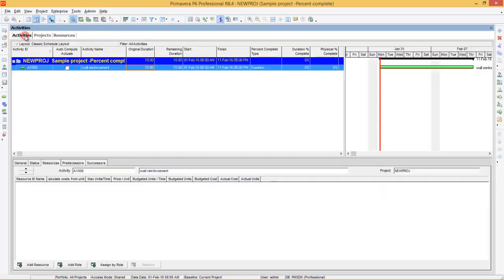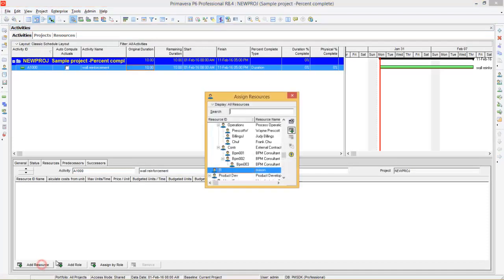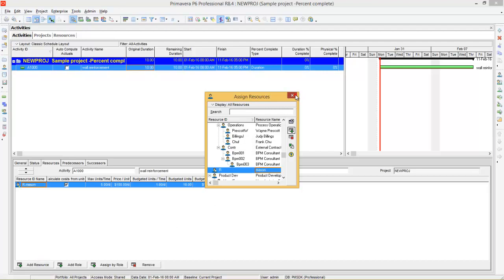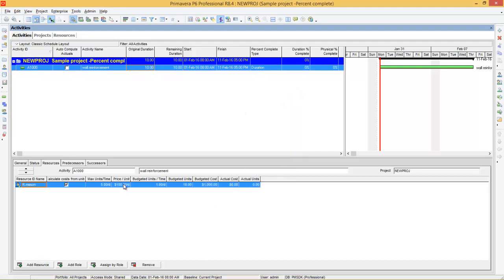After that, go back to activities and assign the resource to the activity. Click Add Resource and assign Mason. Now you can see here 1 Mason — budgeted units per time is 1. That means 1 Mason is working for 10 days, making budgeted units as 10, and the cost is $1000.